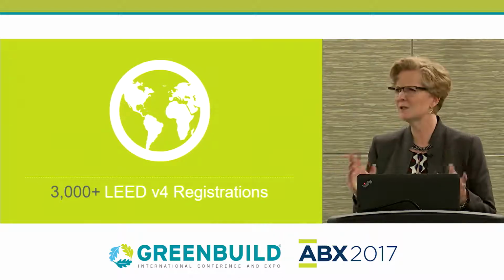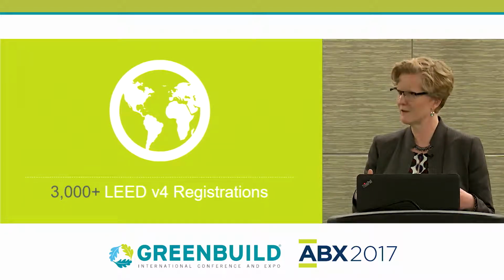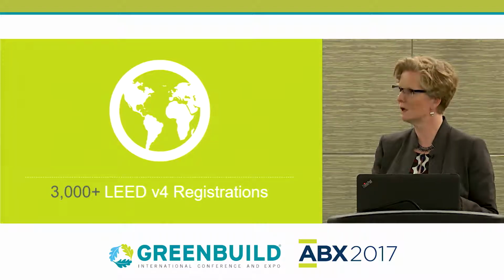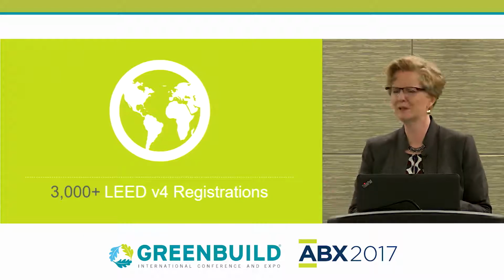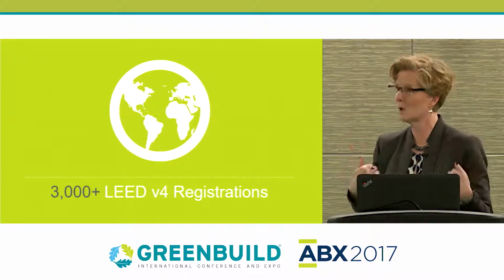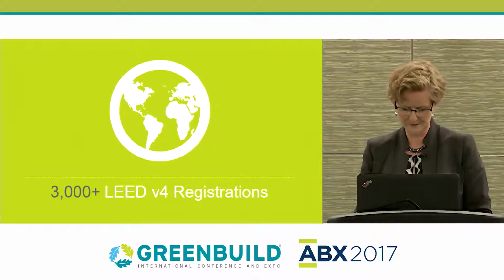So just to give you a little bit of a sense of from registration to submittal, we've got some average numbers. So O&M projects and CI projects tend to come through a little bit faster. Around 18 months is the average time between registration and submitting for review. But for BD&C projects, it's a little bit longer, so it's somewhere between 3 to 5 years. Institutional projects can take longer, but in that 3 to 5 year mark. So we tend to see the crossover of when the newer rating system becomes the predominant one for us in terms of what's coming to GBCI for review, is usually around 3 years after registration closes for the previous rating system.